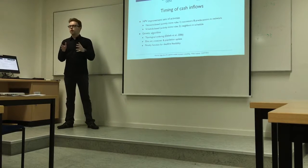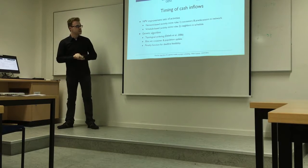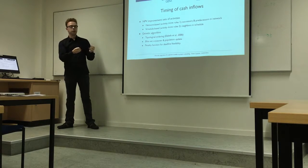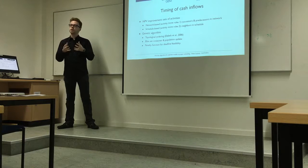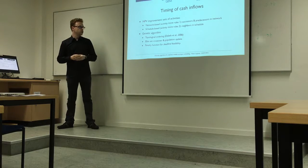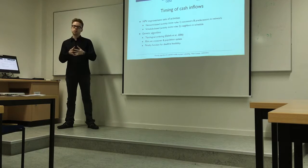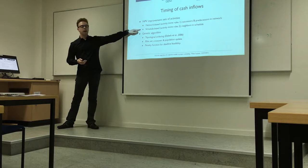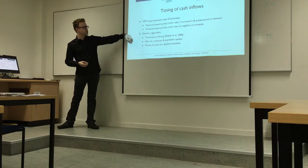To decide whether to delay an activity, we look at its successors in the project network and the predecessors of those successors, constructing a subtree of the entire project network. We then examine the combined NPV of this subset and determine whether it should be delayed. The second set of rules applies similar logic but considers the actual schedule rather than the project network. Importantly, activities added to this subset may be precedence-related, but they don't have to be — unlike the first set where activities were always precedence-related.